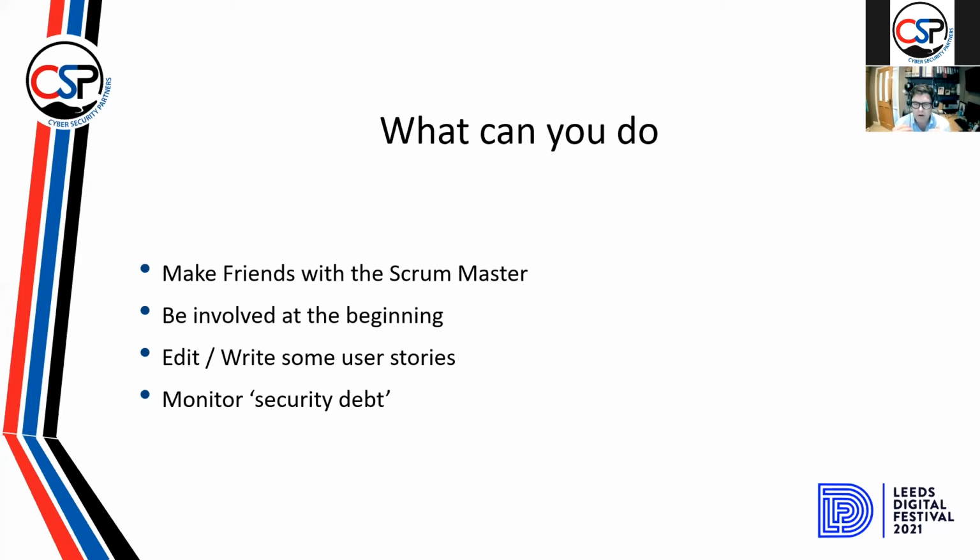If we have the understanding that there is going to be a security control implemented, and there is an issue with it, a technical issue or a timing issue, something that can't be done, that security debt that's created is an immediate flag for a security risk. And it's the identification of that debt, turning it into a risk, so that not only the Scrum team, but also the business owners understand what they're doing.